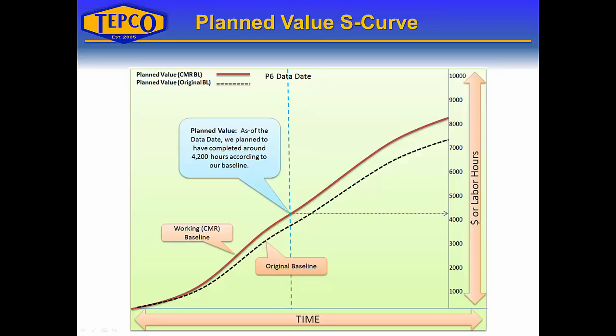Here's an example of the planned value in an S-curve, showing both planned values for the two baselines. We have a working CMR baseline — change management request baseline — and the original baseline. You can see that the CMR baseline has an increase in hours because work was added to that baseline.